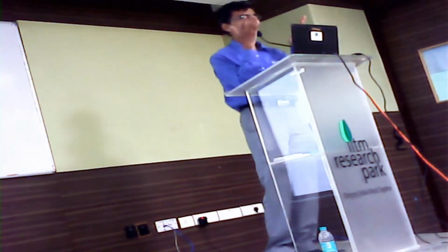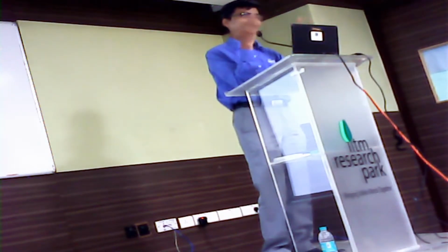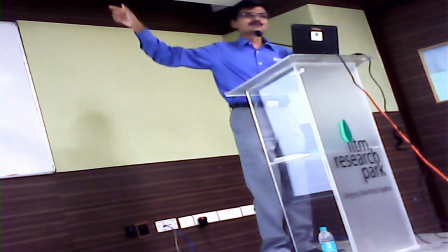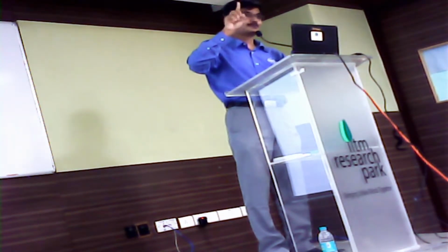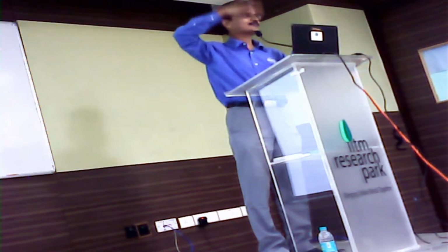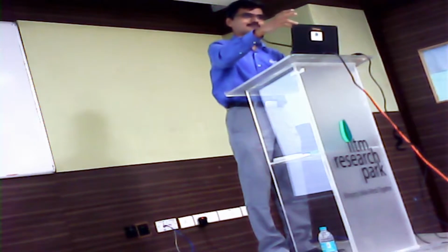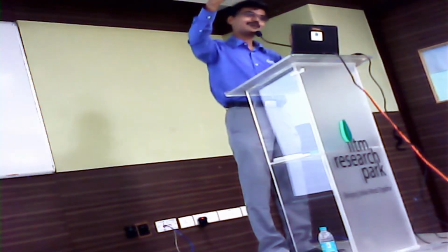We don't have any clarity about whether it is accountable, responsible, consulted or informed. But in Project, when we say resource name, it only talks about responsibility, not about accountability. At a phase level, I will have someone accountable, but at a subtask level, I will have someone responsible. It could even happen the same person is both responsible as well as accountable.